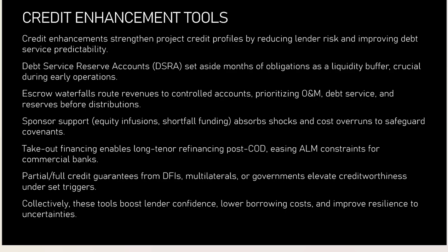distribution to the sponsor. Sponsor support undertakings include equity infusion, guarantees, or shortfall funding, which reinforce project resilience by ensuring the promoter absorbs initial shocks and cost overruns. Takeout financing arrangements allow long-tenure refinancing by specialized institutions once the project becomes operational, addressing the asset liability management challenges faced by commercial banks.